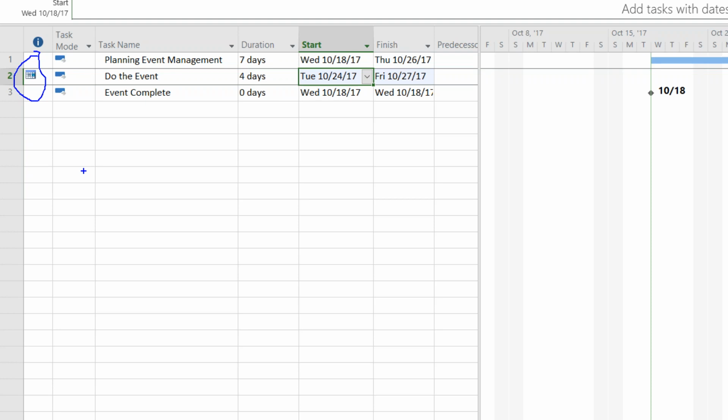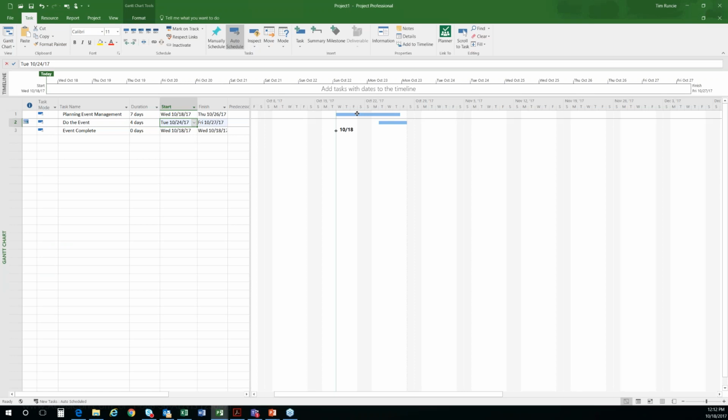And what that means is if you've got a vendor who's sending you project schedules and you're looking at incorporating their data in, if you look down the left-hand side and that symbol is all the way down here, then you're going to find that they basically have hard-coded the dates. So for example here, if I go and I link task 1 to task number 2 and say, hey, let's go ahead and get started, if I set up dates or I pick this up and go, you know what, it's not going to take 7 days, that was supposed to be 1 day for planning, notice how I've compressed my timeline, but row number 2 here is prevented from moving, right? It's prevented from moving left or right depending on the type of constraint that you set there.